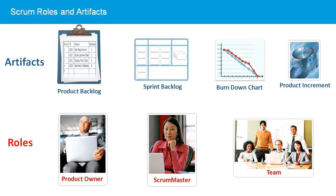The team is a cross-functional, self-organizing group that is responsible for delivering potentially shippable product increments at the end of each sprint. The team helps break down the items in the product backlog into manageable user stories that can be accomplished in a single sprint. During planning, the highest priority items are moved from the product backlog into the sprint backlog to indicate what will be delivered in the next product increment. The team then commits to the items in the sprint backlog and begins development.